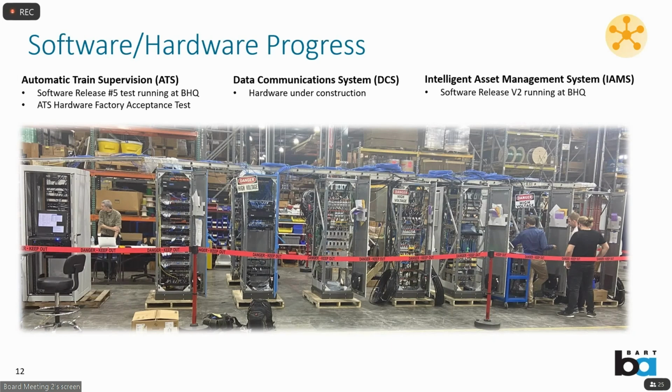These racks and servers will be loaded into a train control room in South Carolina and then unplugged, and the whole train control room, then filled with all this equipment, will be trucked over 2 mountain passes across the United States and arrive at the Hayward Test Track late next summer. We see the fruits of all of those hours of design in that hardware.